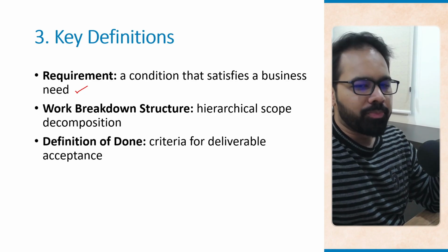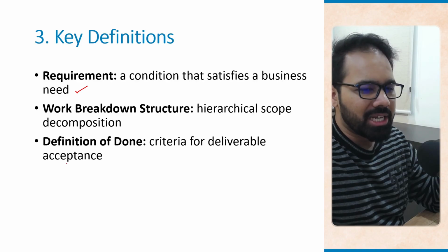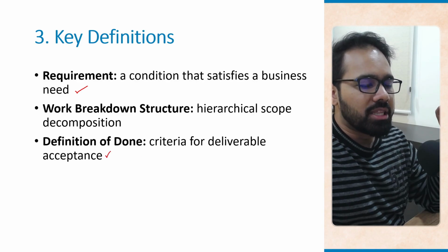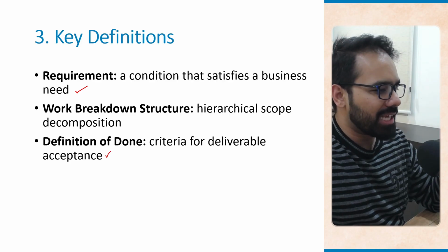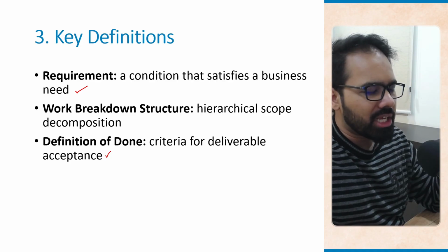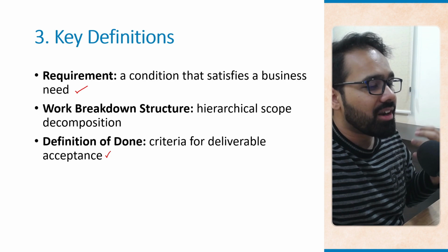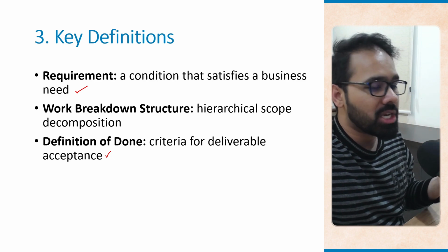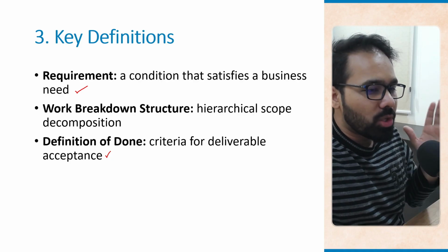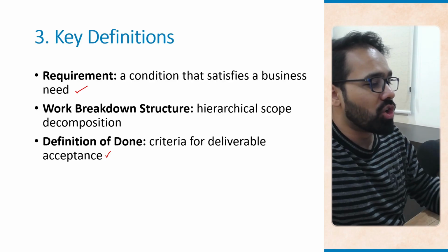Definition of done: criteria for deliverable acceptance. So whenever your deliverable is done, what is the criteria that needs to be fulfilled for the deliverable to be accepted by the stakeholders, right? As an example, the product search feature in our e-commerce website example will be done only when it returns accurate results, loads, let's say, within 2 seconds, and passes user testing. Only then can this feature be marked as complete. So that is definition of done.